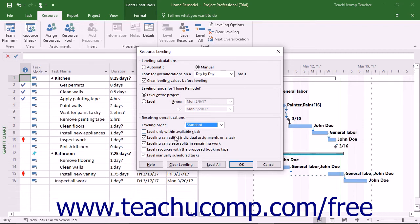You can check the Leveling Can Adjust Individual Assignments on a Task checkbox to let project add leveling delay to individual work resource assignments on a task independently of other assigned work resources.